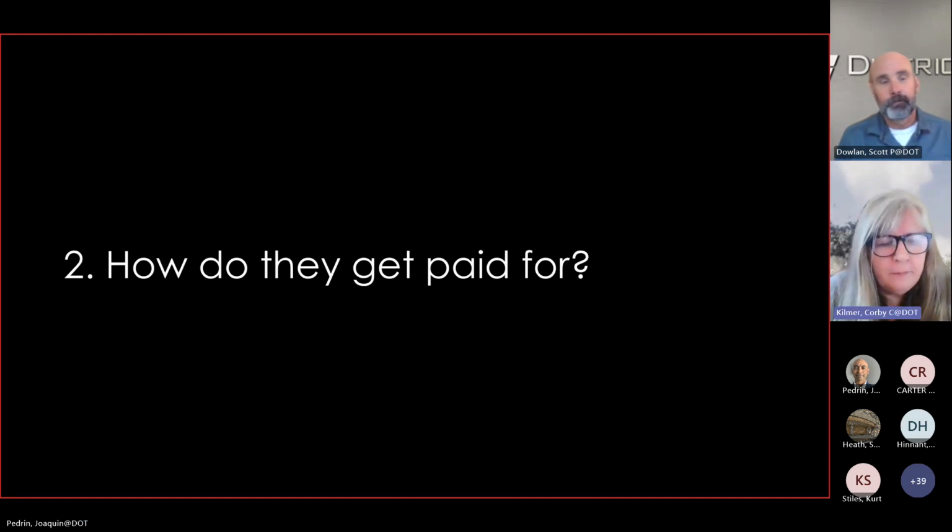It's twofold. At the K phase, it really is just baked into the process, right? Again, it's an expected component of the kickoff of the PID, and K phase is just resourced with X number of hours, and nobody really questions it. And then going forward, when Scott and I do work plans, we just include it in our work plan as part of our work products based on what comes out of that PID kickoff, right?